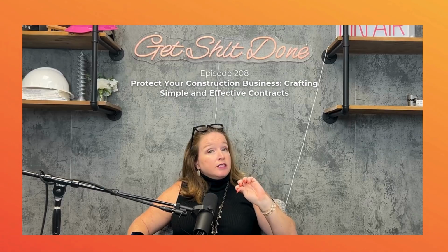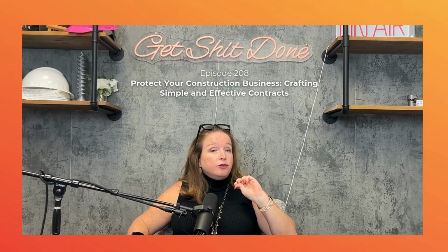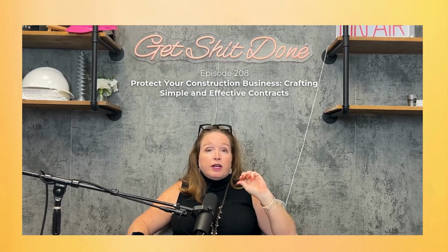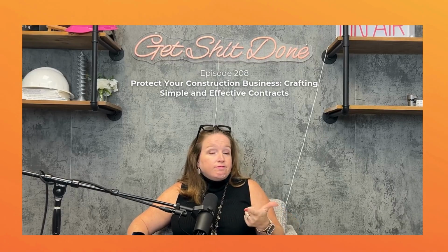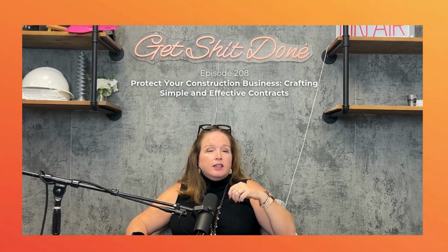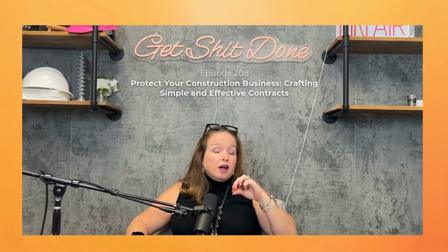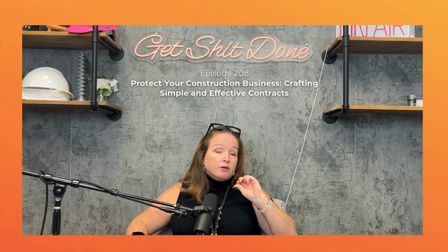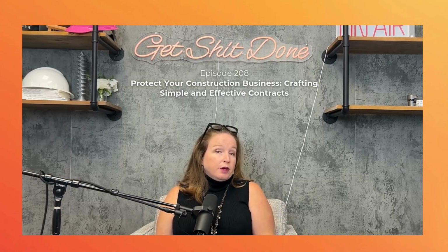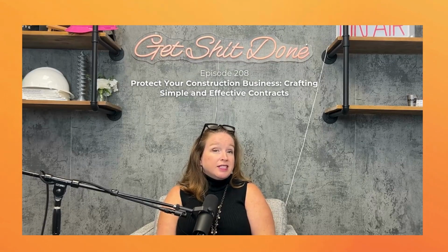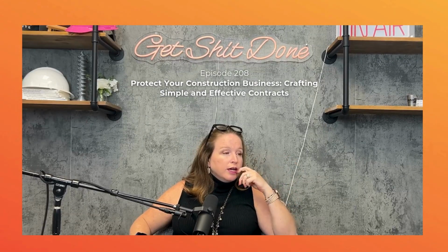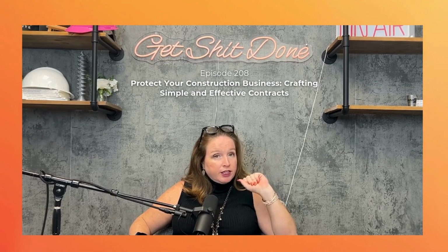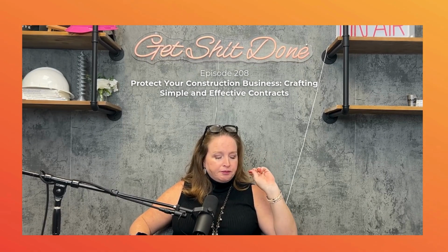Some successful ways I've seen in handling them is to negotiate what the price would be, right? Time and materials plus 10% for profit and overhead. Build in the formula of what a change order would look like. So that way, when we get there, we know what it's going to be and we're not going to fight, right? We have been successful at doing that in change orders and pushing back there. So watch out for change order directives. Make sure you understand what it means and how you can negotiate them.